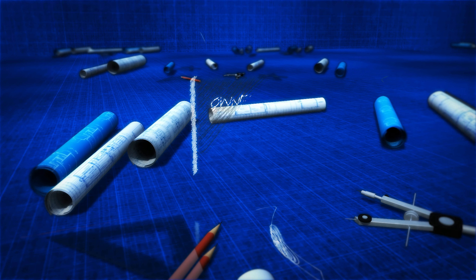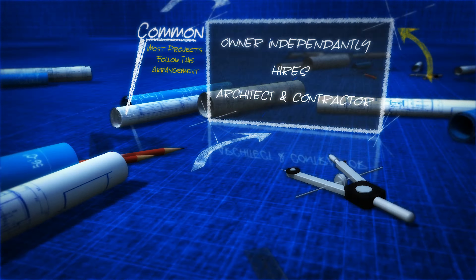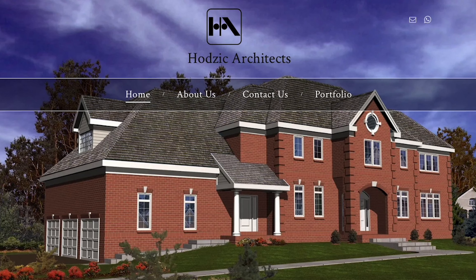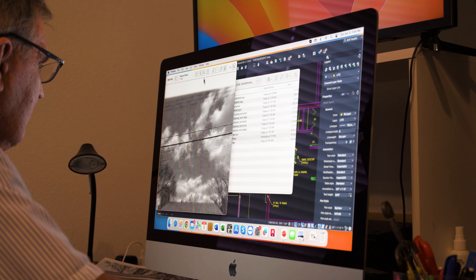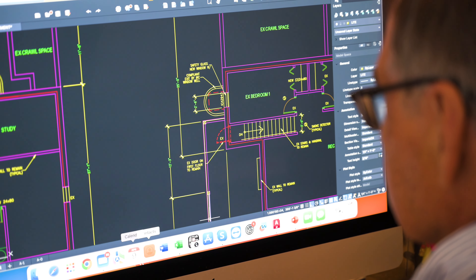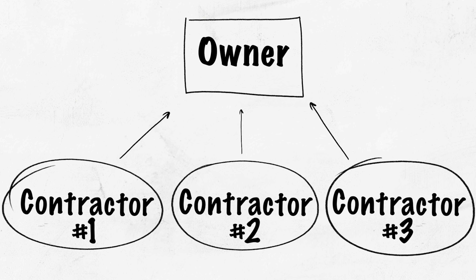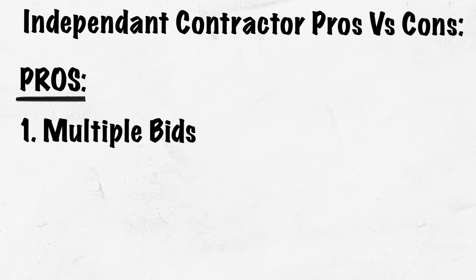We're going to break down the pros and cons of each arrangement to help you decide which one might be right for you. Number one: the owner can select the architect, the architect prepares drawings in collaboration with the owner, designs the project, makes the construction drawings, and then issues the drawings for bidding to contractors. We like to see three contractors bidding on the project, after which the owner can select which one they want.